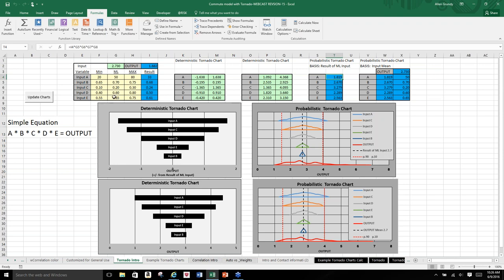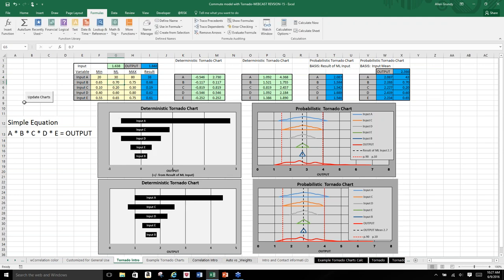Since all of these distributions are symmetrical, the result of the most likely input is the same as the mean. And so this chart down here is built with respect to the mean, where instead of holding everything at its most likely, you're holding it at the mean except for the curve that you're interested in. So if these are exactly the same as they are symmetrical, but if you change this, I'll make variable A asymmetric,